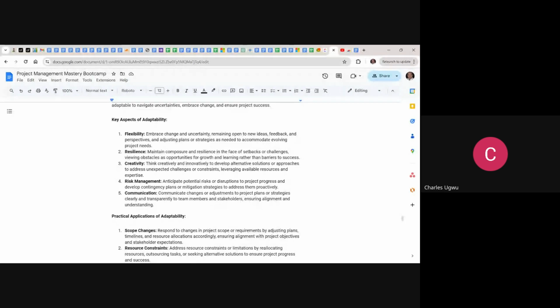Although equally, if you manage it very well in a waterfall environment, they like so much documentation. Any move you need to make while the project charter has been approved, you must document it. In everything, there's a high level of documentation. But in agile, the product owner can easily call off a sprint that is going on because there is a change.